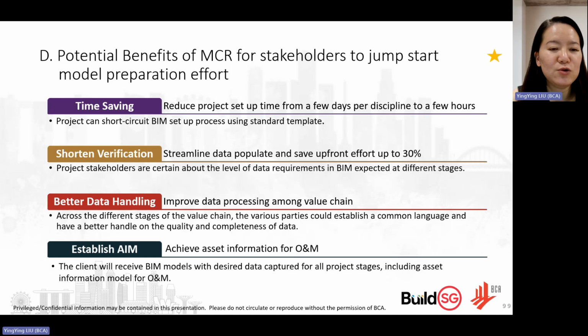MCR intends to be a new process to facilitate data development and use BIM for upfront collaboration and downstream execution. As mentioned, the MCR setup template developed can reduce the manual effort and save the setup time from a few days to a few hours. MCR stipulates information based on the project stages, which can save upfront data production efforts up to 30%.